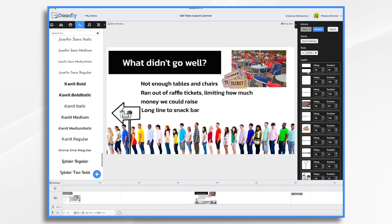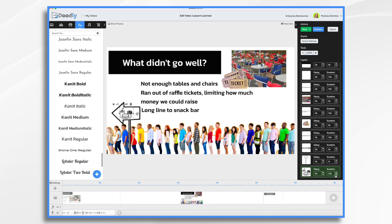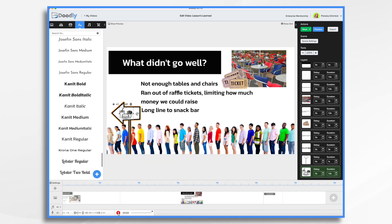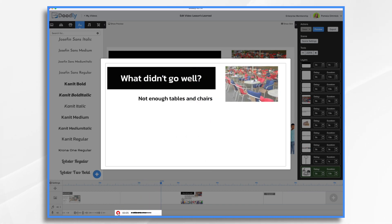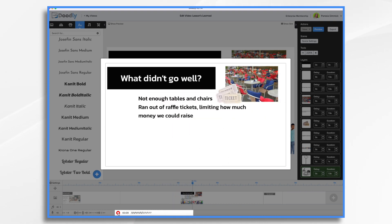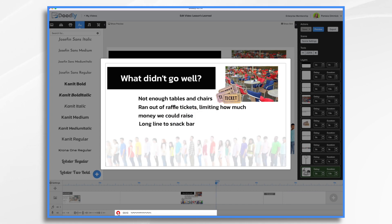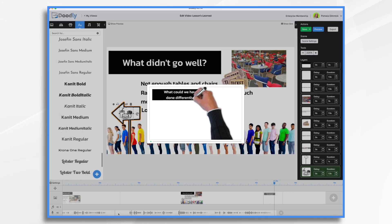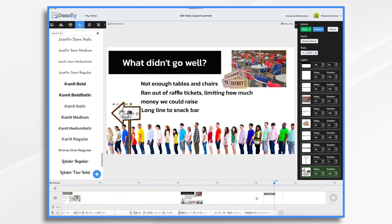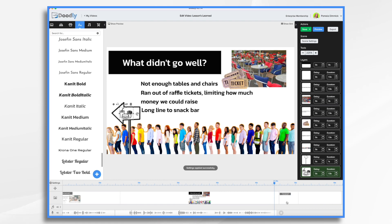I'll click the photos and apply the fade effect. The sign can be drawn on faster. Then I add my voiceover: what didn't go so well? We didn't have enough tables and chairs for all the people who showed up. We also ran out of tickets and that limited how much money we could raise. And there was a huge long line to the snack bar, so we had hungry players that weren't terribly happy with us. We're really close on timing, so I'll add a couple of seconds to the end. On to the last scene.